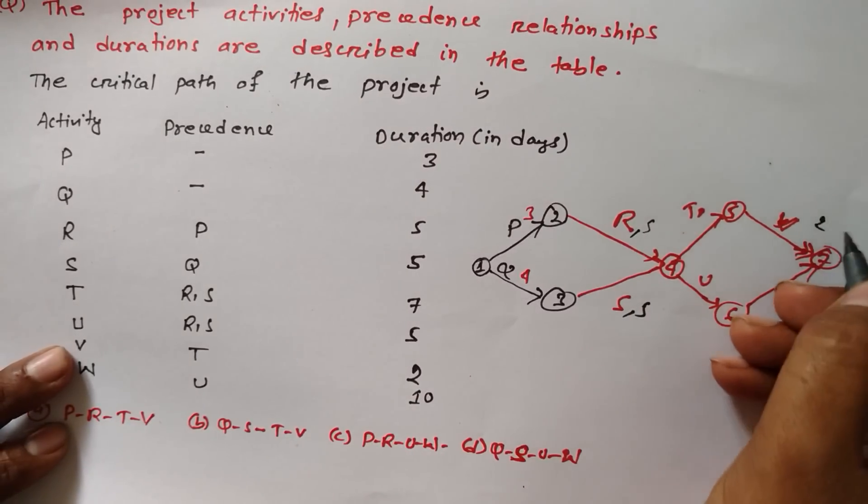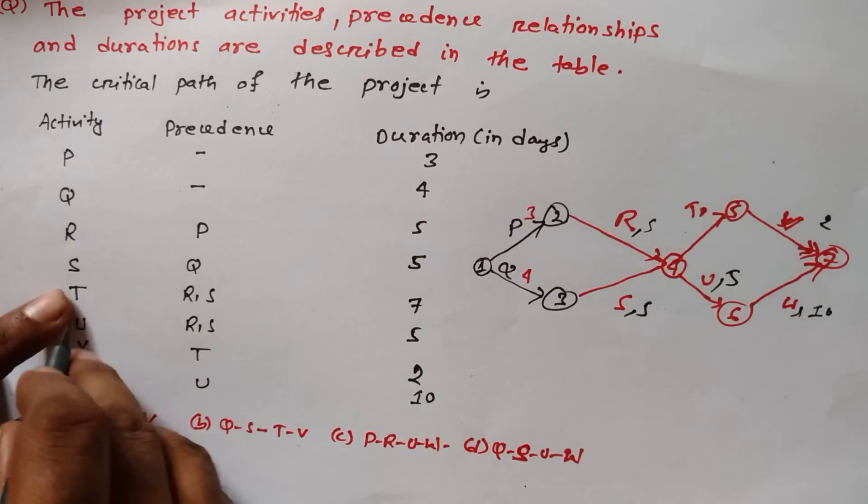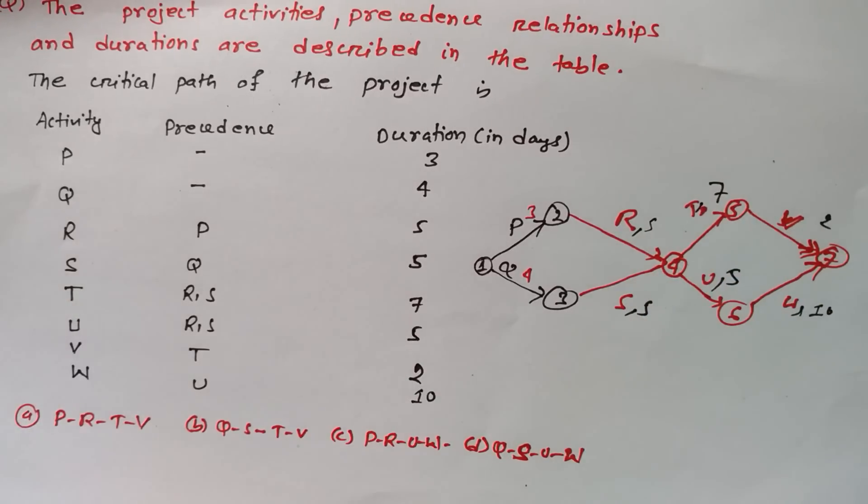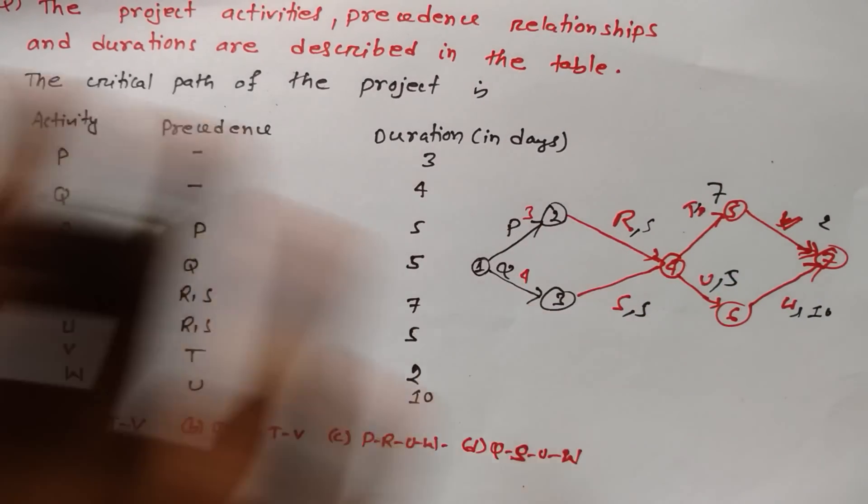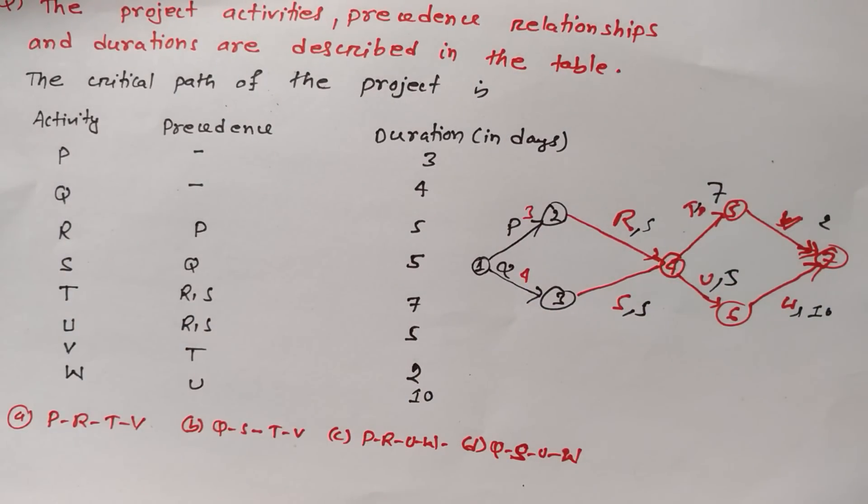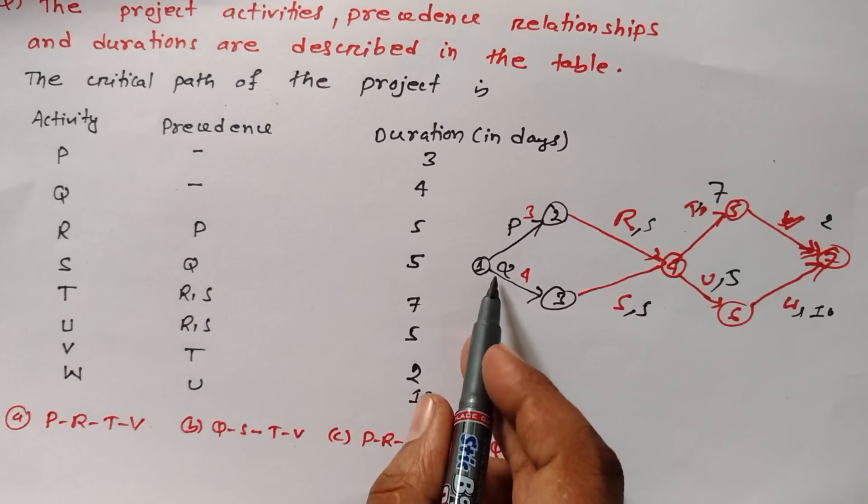So here we got the network diagram. Now we have to find out critical path. Critical path is that path which is taking maximum number of days and maximum time to complete the project. We have to see how many paths are there to complete the project - paths are Q-S-U-W, P-R-U-W.